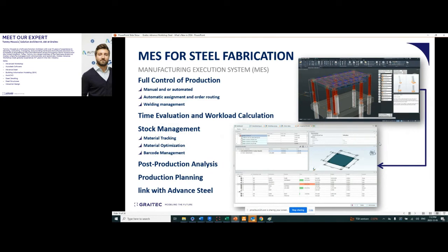We can even have post-production analysis done in the software so that you can compare the theoretical values for time allocation and cost allocation upon import of metadata of the CAD data, and compare it to the actual time spent in production with the utilization of touch boxes and PDAs while you're scanning through each step of the project.